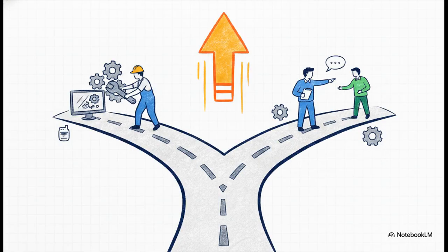Which brings us to this non-negotiable executive rule for PMs. You must separate operational issues from true system defects. This is how you protect your project momentum. It ensures your tech team is actually spending their time fixing broken system queues and interface errors, while the business leaders take accountability for operational compliance, cleaning up missing master data, and getting their users properly trained.